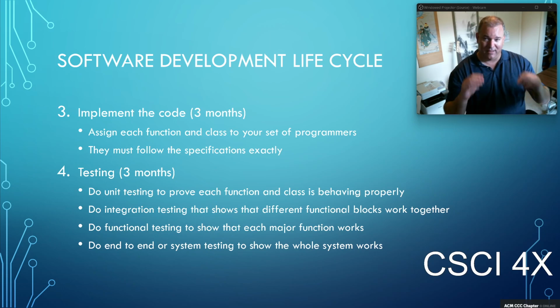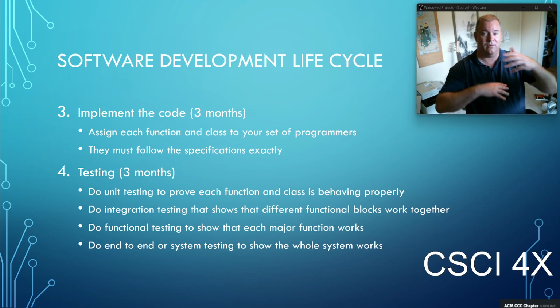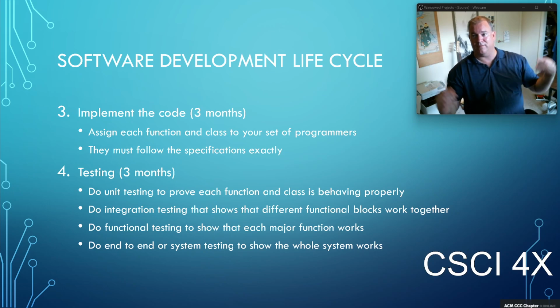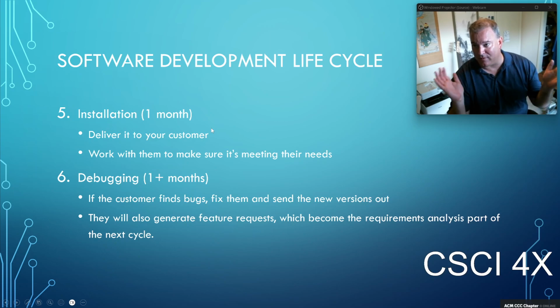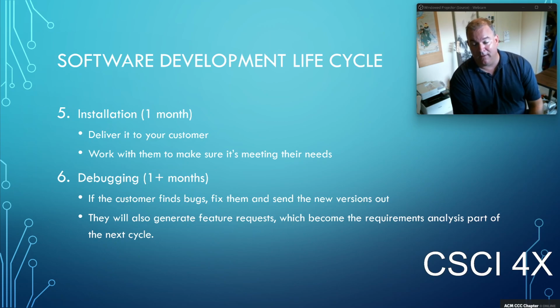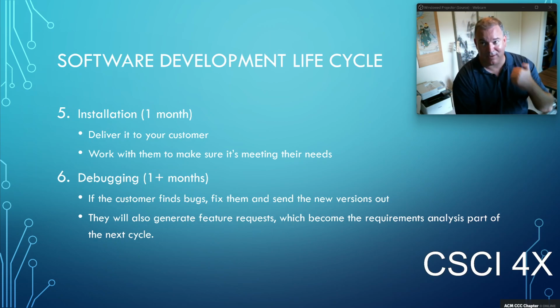So you have to test each function. You do functional testing and integration testing where you connect functions together. You do end-to-end testing, and you sort of test at all the different levels. And then you finally roll it out to the client. So you go into the hospital, you install your new time card system, and then you wait for things to break. And people come in, beep, beep, thumbprint reader's not working.